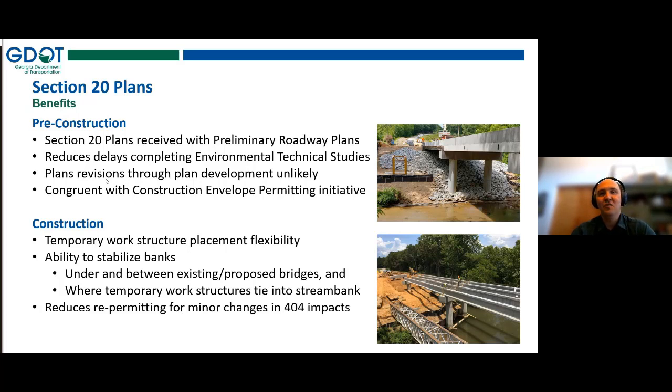And on the environmental side, the big advantage to this is that we're going to reduce the number of times that we have to redocument and re-permit for what really usually amounts to very minor changes to 404 impact. So this is a huge, huge benefit to the design, to construction, and also to environmental as well. And so we're pretty excited about this new approach.